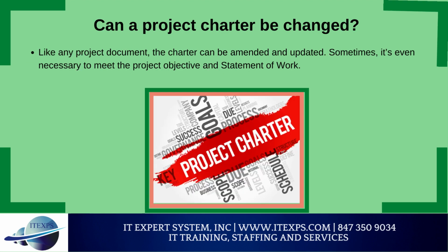Can a project charter be changed? Like any project document, the charter can be amended and updated. Sometimes, it is even necessary to meet the project objective and statement of work. The project initiator, sponsor, or change control board has to approve changes. Before the project manager proposes changes to the charter, they need to consider the effect on these: time, scope, cost, quality, risk, resources.